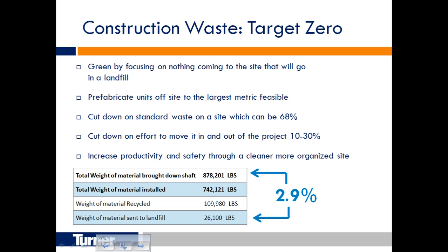When we figured 200 pounds of waste in about an hour to either move that on and move it off, we're looking at almost $300,000 savings just in moving material on and off site. From a construction standpoint, most workers spend about 1/3 of their time moving material. So it's something that we feel, from both the green side and the labor side, is a win-win.